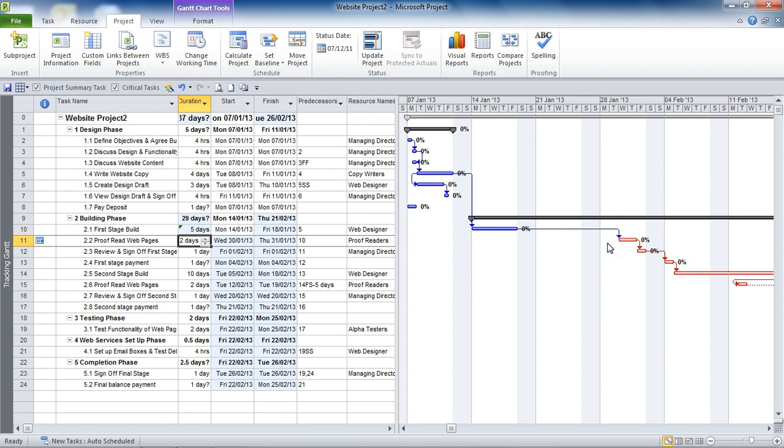And this is why the constraints are normally encouraged only if it's an external factor, something out of your control, because they will affect your scheduling, they are affecting the critical path here as well, for good reason. It needs to be that way, maybe in the example that I'm using. But sometimes, you know, take into consideration there may be a better alternative. You may want to use a deadline. You might want to just add some notes to your task. Something that won't affect scheduling, but will bring to your attention that you should be finished by that date, or you should start no later than this date, or something like that.